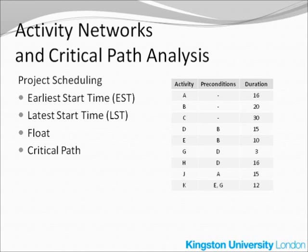As for activity D or activity E, both of them have to wait until activity B is completed — only then you can go ahead with D and E. Similarly, for example, activity G has to wait until activity D is completed. If you look at the bottom of this table, activity K has two preconditions. It means that you have to wait until both activities E and G are completed before you go ahead with activity K.